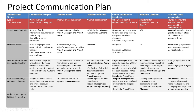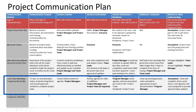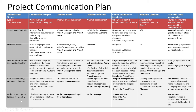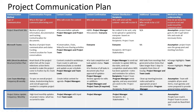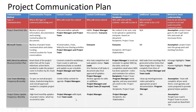We have core team meetings — you can have as many meetings as you want here, and you can see exactly who is included and the expectations for them. For project status updates, the frequency is monthly. Every stakeholder can receive this. As project manager, I create the content with some team leads, confirm it, give monthly updates, and assume people have read it. They have access through emails and SharePoint sites depending on how I house my update.